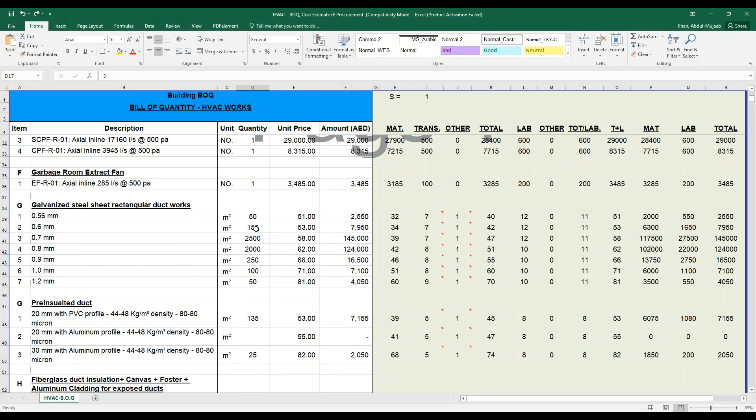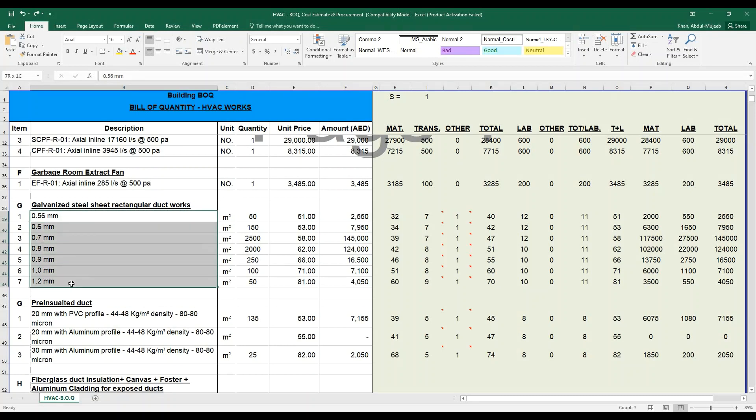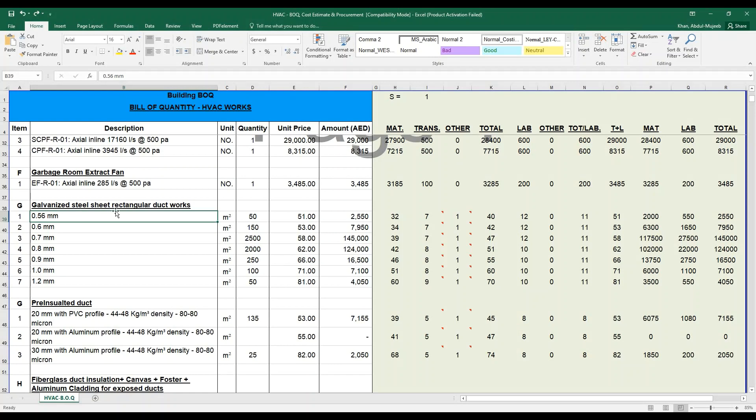Let us check an example of a galvanized sheet rectangular duct. Rectangular duct is basically measured in square meters. When measuring a rectangular duct in square meters, you have to change the type of unit. Then you have to maintain the type of thickness of the sheets. These are the various types of thickness in mm. Galvanized sheets are also measured in gauges. I will mention the type of gauges in a different video for your better understanding.